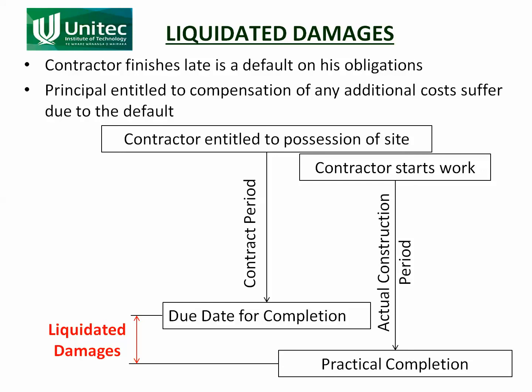Those costs are estimated at the beginning of the contract. Liquidated damages is part of the contractual agreement — the contractor agrees to pay the principal a certain amount of money for every week over that he runs. That is part of the agreement. So if he does run over, then he has to pay it. In fact, what happens is the money is deducted from money that is owed to him.